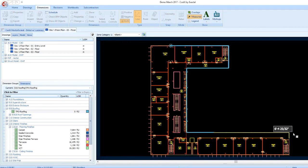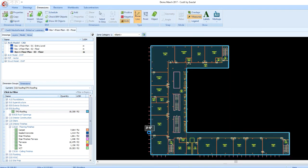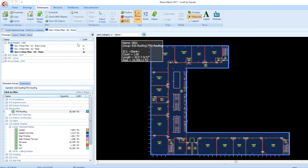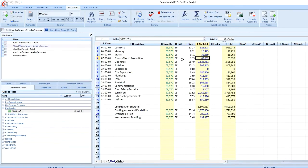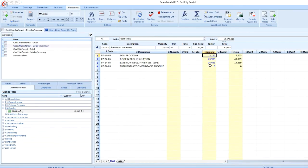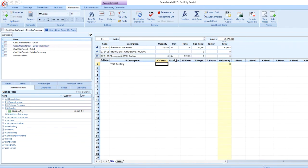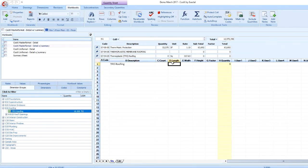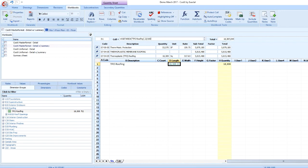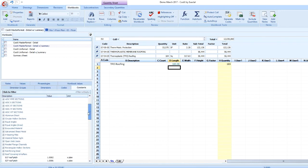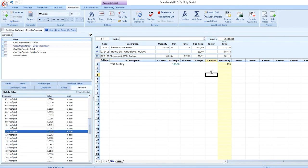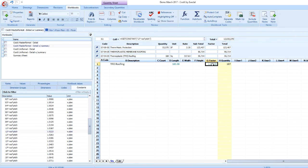Constants can be incorporated into the workbook by easily dragging and dropping them into the appropriate cell in the workbook. To apply a roof pitch factor to a roofing area, I'll simply drag and drop the newly measured roof area and then do the same for the roof pitch factor to bring it into the factor column. You'll notice that they are dropped in as green text, which denotes they are live-linked.